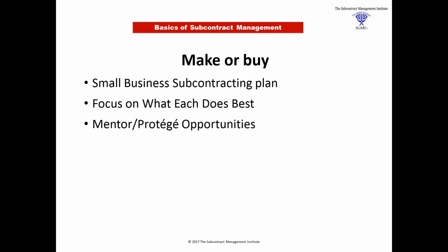Now, of course, the subcontracting plan is only required from large businesses over certain dollar value contracts. And there's an interesting thing in the law and in the regulations. It says when subcontracting opportunities exist. So arguably, if a prime contractor could do 100% all by themselves, they should be permitted to do so. Typically, however, given the pressures of the socioeconomic programs, they are sometimes required to sub out work that they would have preferred to do inside.